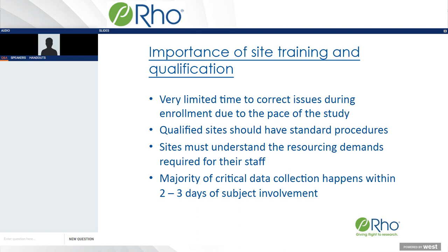Along with that, providing clear instructions to sites regarding the documentation of those qualifications and/or certifications up front. Again, you don't want to be several months down the line, reviewing the data and reviewing their binder, and discover that 2 staff members that had completed some really important procedures on your study have now left and their training certifications were never appropriately documented. So setting those expectations in place and making sure that everything is in place and that they're very clear at the SIV is very important.